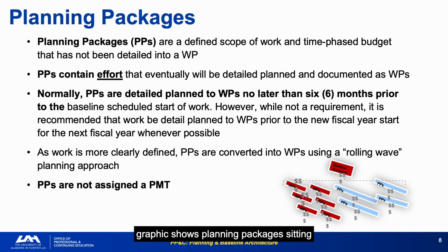The graphic shows planning packages sitting alongside work packages within a control account. This architecture enables the project to plan near-term work in detail while maintaining budget visibility for work that's 12 to 18 months out.